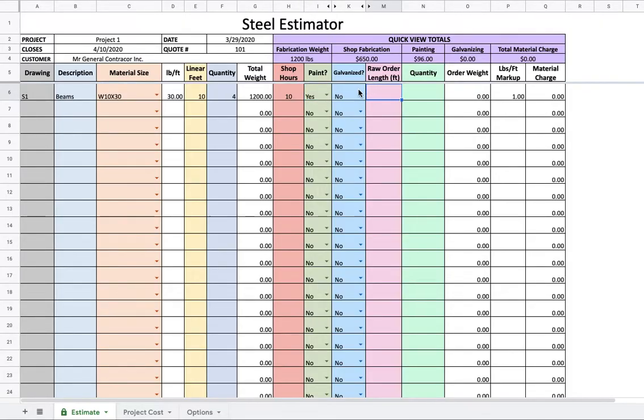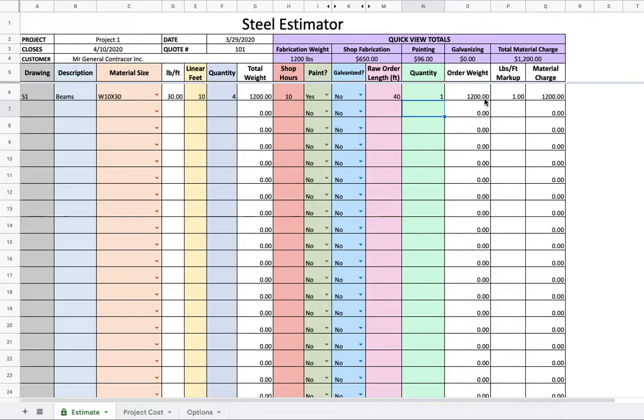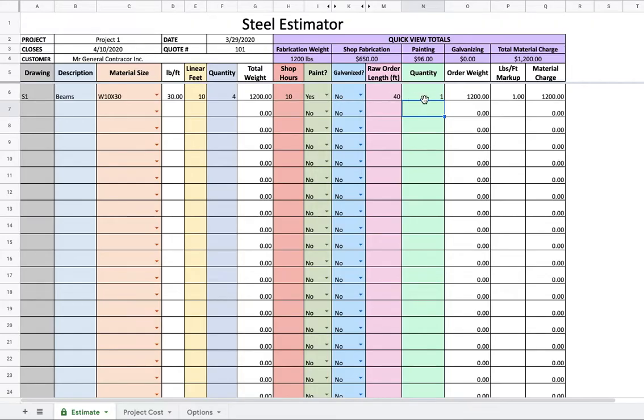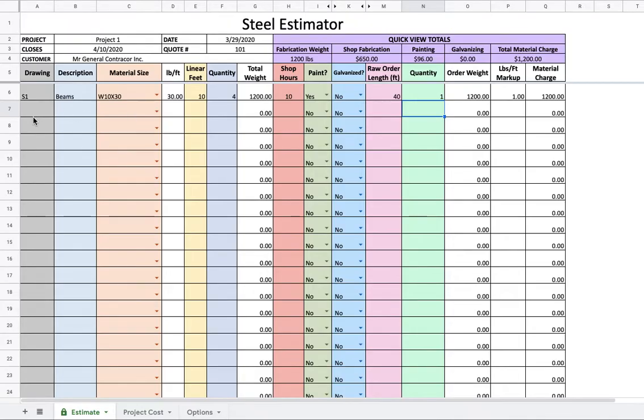Is it painted? Yes, it's painted. You can see up here, quick view totals. It's already tabulating, and we'll see later how that all comes together. Raw order length. Looks like we will need a 40 footer, 40 feet, one quantity. It's going to get the order weight we need, and we're going to talk about this markup later, and then that times that is material charge that is going to be on our total project cost.